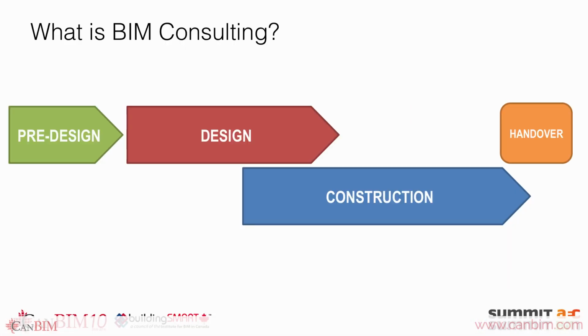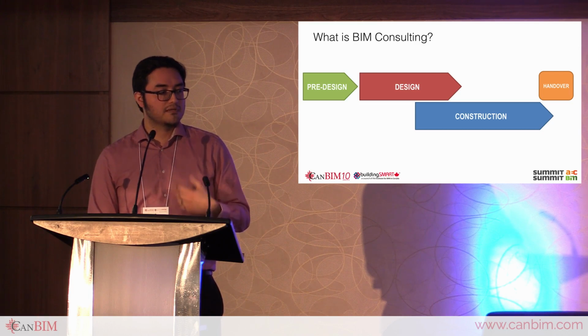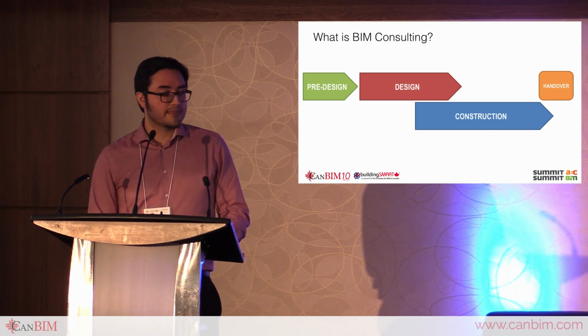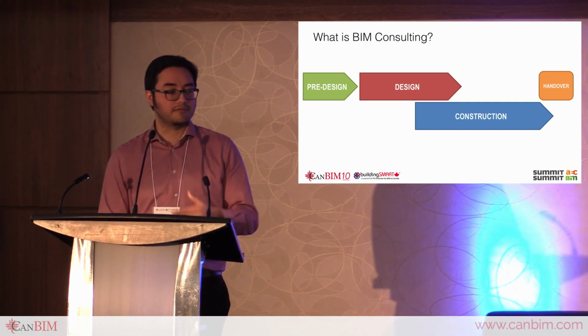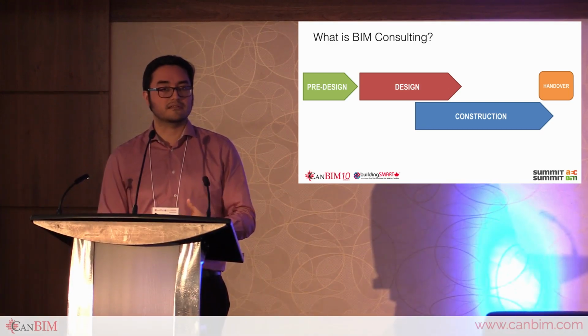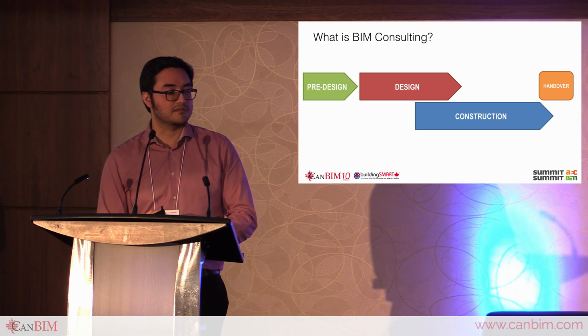But we have, and BIM consulting can bring value just during design and construction if needed, for that same purposes, to expose the data to a larger audience to review it, during construction to collect data and push it onto handover for facilities maintenance if needed. And we have done previous engagements with just contractors who just needed to deliver basically that last step of collecting the installed information. We have methods of doing that using the model, so that handover, again, is not manual entry that takes months and ages. It's during construction, as the data gets uploaded, as things happen, you know what is going in, you see the shop drawings, and it's all done.